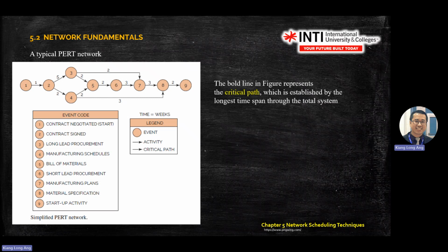Okay. We already covered what the critical path is. The critical path is the longest time in the network that you can commit to your customers. There are four ways of finding it. One is to calculate the longest path, the first method. Second, you go to your rubrics, ES,